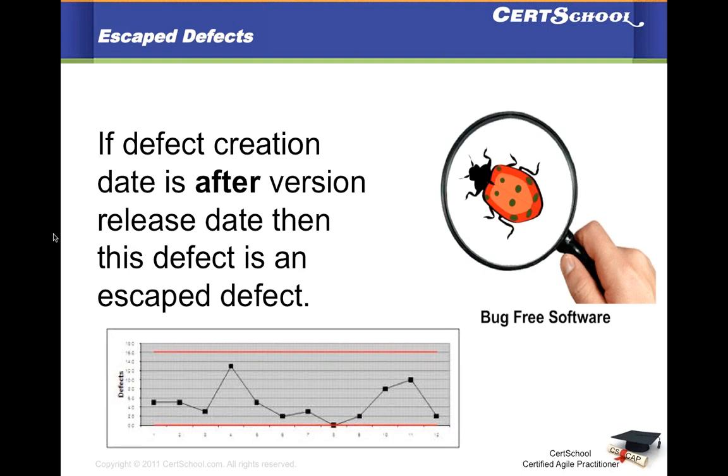There are different ways of handling escape defects in Agile when we are working in iterative mode. One way is that you create that defect as a special type of story, and make it go back to the product backlog where it gets prioritized by the product owner, and based on the priority, it gets incorporated. Another way is that you can reopen the story from where it escaped, and just rework it as a part of that story. Which is not the most elegant way.